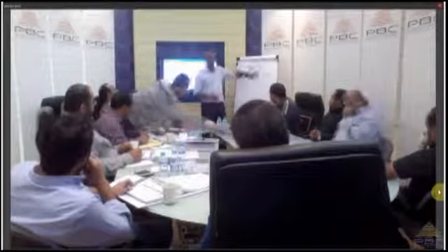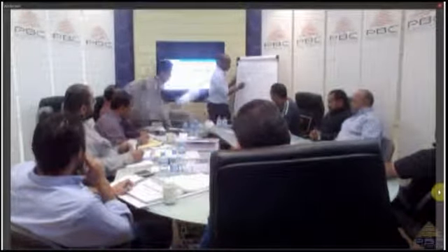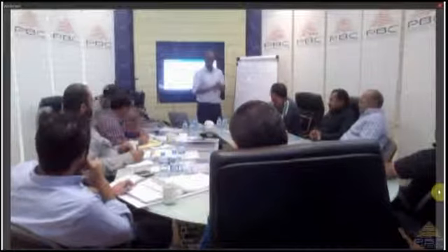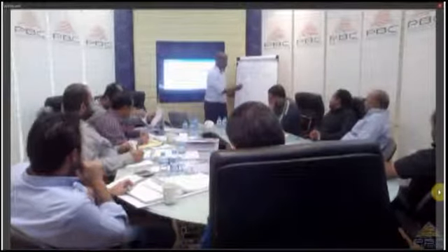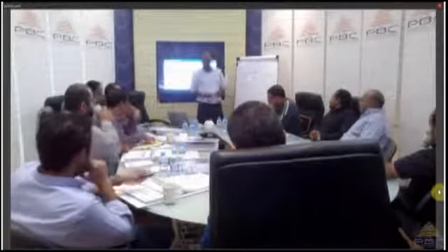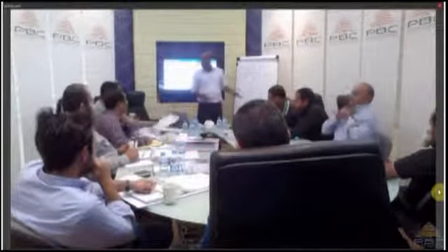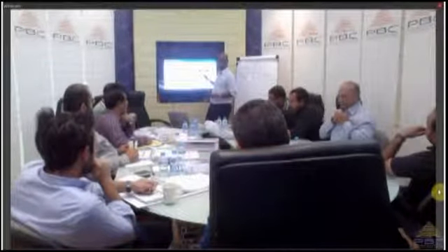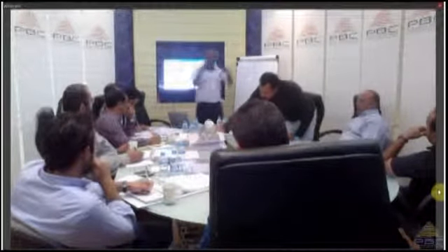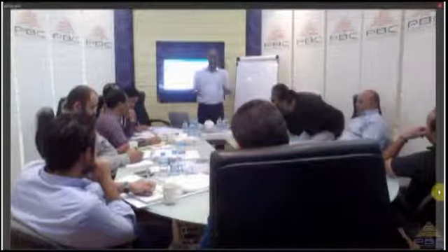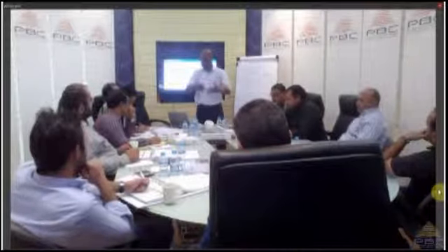So let's assume the painter will bring his own equipment. This is one of the bases of estimates: the painter will have his equipment with him, so there won't be any cost for the equipment. The second assumption is the painter should be able to paint the room, so he or she should be skillful enough. These are called the basis of estimates. Why do we need to document them? Because later on, if we realize that the painter is not skillful enough, and we have to change the painter, or maybe put him through a course on how to paint a room, that's extra cost.